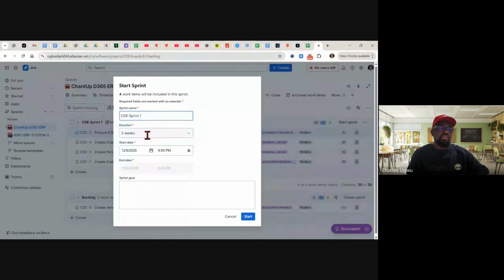And it selects Sprint 2 for us, a 2-week sprint. 2 weeks is the most popular sprint duration. But according to the Scrum Guide, we can do more than 2 weeks, we can do less than 2 weeks. And you see it here, you see 1 week, 3 weeks, 4 weeks. Well, let's choose 2 weeks. And we choose it, the date is already configured.